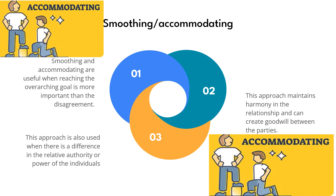Example 1: Scope adjustment. Consider a project where the project team has concerns about a proposed scope change that the client is adamant about implementing, believing it could jeopardize the project timeline and budget. However, maintaining a positive relationship with the client is crucial for future business opportunities. In a smoothing, accommodating approach, the project manager acknowledges the client's perspective and offers to accommodate the scope change while minimizing its impact on timeline and budget, prioritizing goodwill and a successful project outcome even if some adjustments are required.